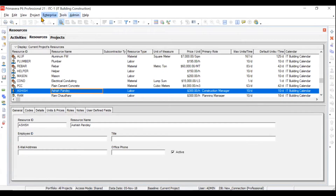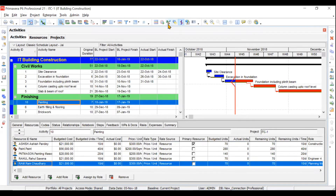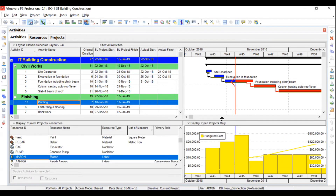Then we will move to resource usage profile and histogram, and resource assignments. If you click on the resource usage profile, you can see data related to your resources in chart format, which you can use to analyze resource information — weekly, monthly, or daily reports showing total cost, total units utilized for labor or plant and machinery. This gives typical resource information in the form of histograms or charts.